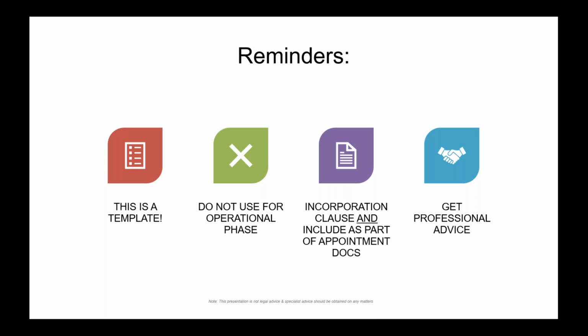And from our experience, since it's been issued, we have also put in a reminder that for the information protocol to be used, you need both an incorporation clause. So the clause within the guidance, which basically says the information protocol is part of the contract and a part of the appointment. And you need to actually attach it as part of the appointment documents. For example, whether it's in the schedule, or one of the schedules, or if you're using a form of appointment like the NEC, you may put it in the body of the appointment itself.